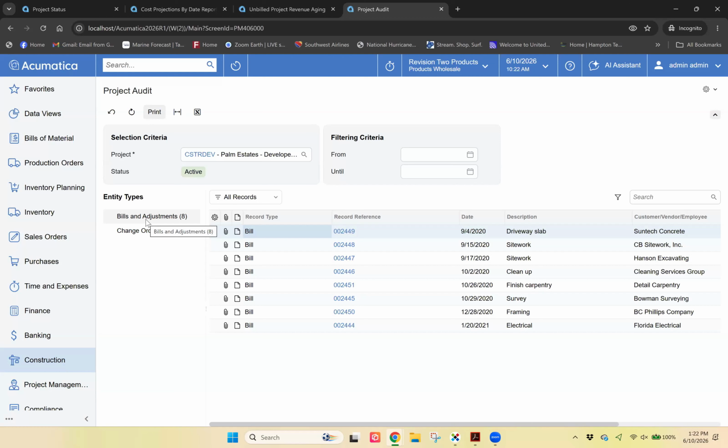And you're getting the right results when you're looking at your postmortem, if you will: what did we do on our margins? How did our costs come in? Are we over or under budget? Do we need to adjust those as we're bidding out future projects? Are these lessons learned that we can take into formulas and our processes when we're trying to bid and win these jobs? Information is critical for that, so that you know that you're covering your margins in a way that you expect.